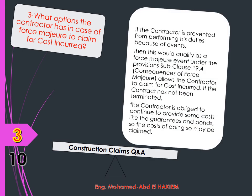Question 3: What options does the contractor have in the case of force majeure to claim for costs incurred? Answer: If the contractor is prevented from performing his duties because of such events, this would qualify as a force majeure event under the provisions of sub-clause 19. The consequences of force majeure allow the contractor to claim for costs incurred.